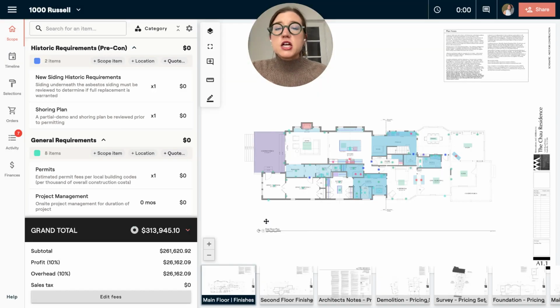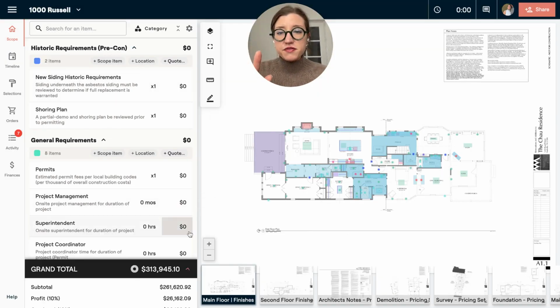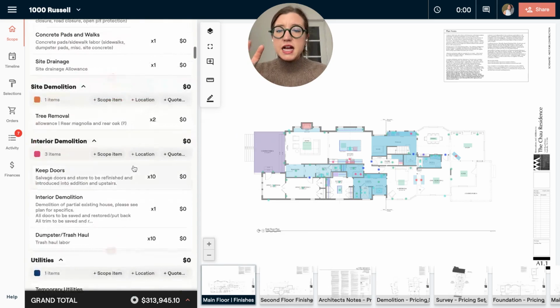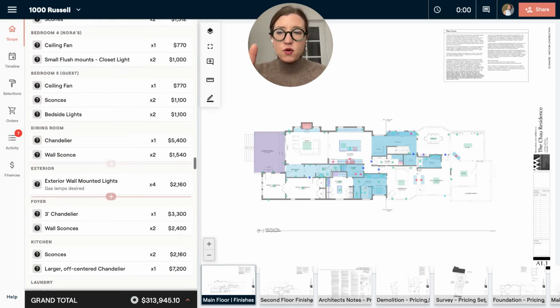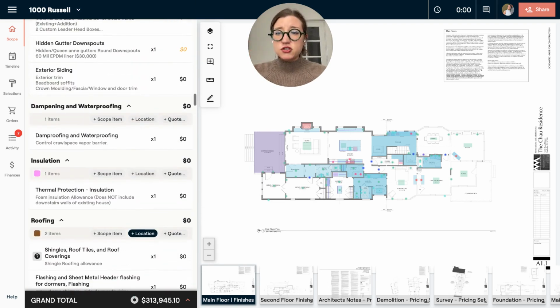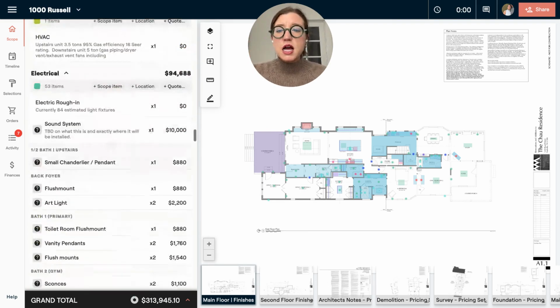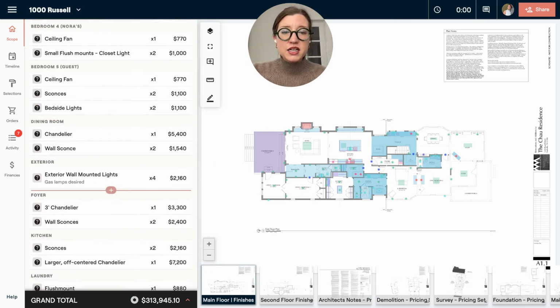to their clients. So now that I have these fee structures set up, I've started to put in an estimate for all of the selections that are needed. You'll notice that actually a lot of the construction items I don't have budgets for, but all of the selections I am putting in budgets for. And this is just an idea because we're in the design phase. What is it that they want to select? And once they select those, we will customize the construction estimate accordingly.